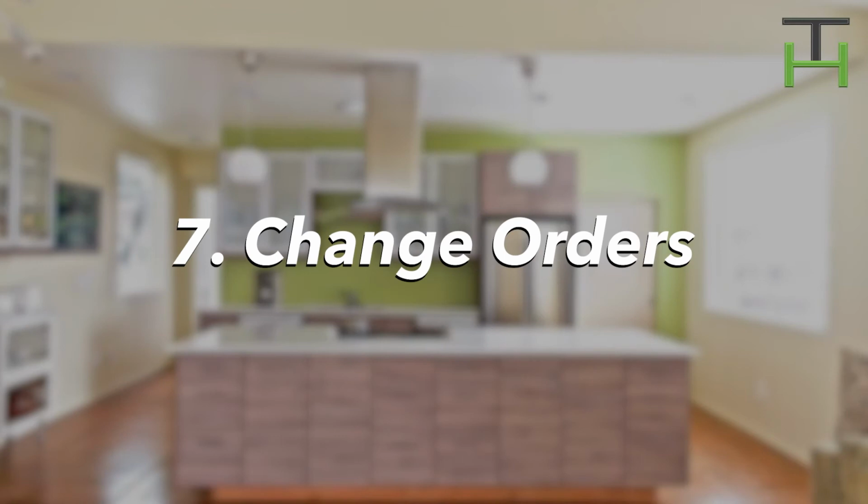Number 7, change orders. Change orders are a rough one within this business. We have in our contract the fact that, hey, if things go difficultly, we can charge you per change order a $100 fee. Now, in 17 years, we've never actually charged that because we haven't ended up in that situation with a client. But if you're going to write a change order, or if you want to change something, they need to give you something that's written and all spelled out, and it can be in an email.